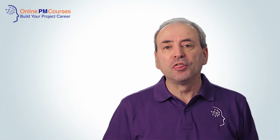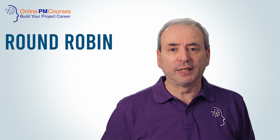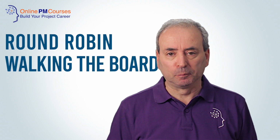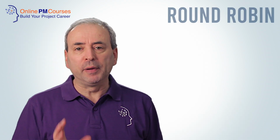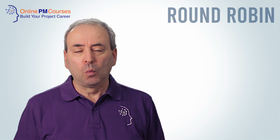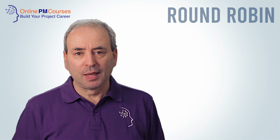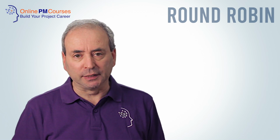There are two styles of daily stand-up meeting that are commonly used. These are the round robin, often associated with the 3 questions, and working the board or walking the board approach. Let's start with the round robin. In a round robin daily stand-up, the facilitator of the stand-up will go around the room, working through each member of the team and asking them a set number of questions and getting their responses.